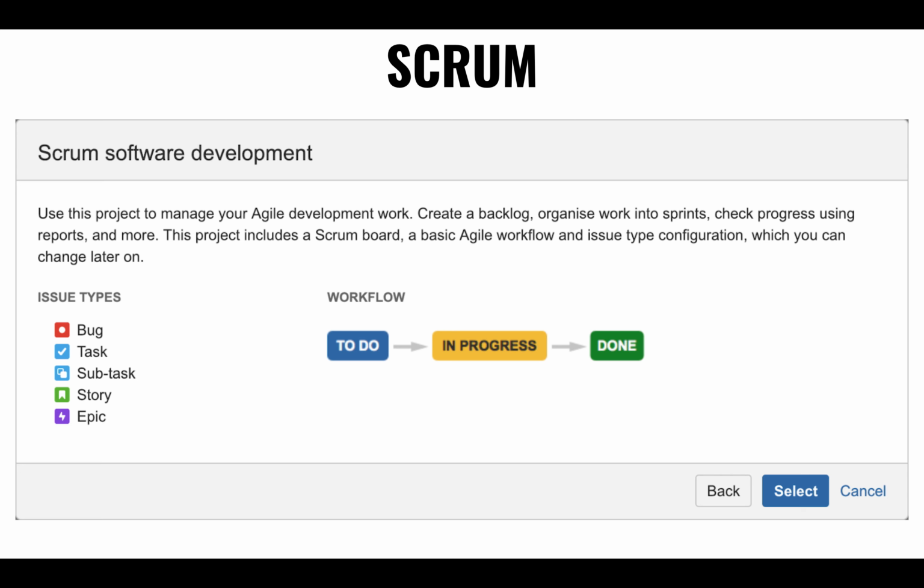Here's a particular type of story. Usually a story will be mostly new features, right, that are represented as user stories, saying what the actor is and what it is they want to accomplish. But there are other different types of stories that you're asked to create, such as research stories or design stories, right? For instance, to learn JPA, we're asking you to create a research story, where we walk you through implementing those 3 or 4 files, for researching and learning how to use JPA. So that's going to be one of the research stories in there.